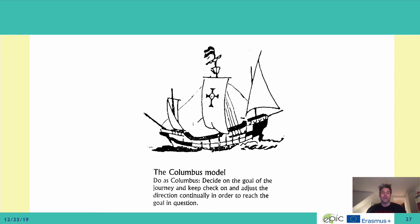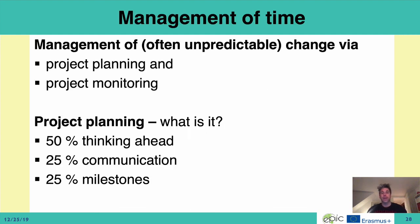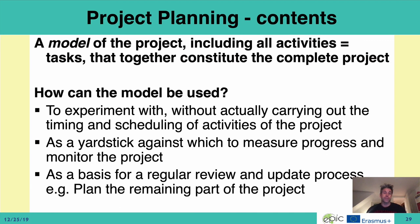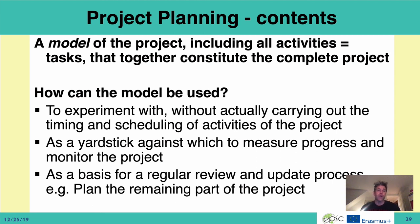The plan is an instrument to make that happen. Management of time is really management of unpredictable changes that will always happen, via project planning and project monitoring. Project planning is really 50% thinking ahead, 25% communication, and 25% milestones. The project plan is really a model of the project, including all of its activities — that is, the tasks which together constitute the complete project.